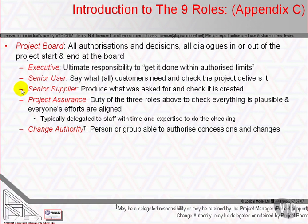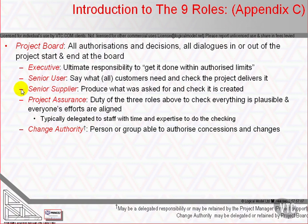The project board members' accountability for specifying and overseeing may be beyond their technical skills or available time. Typically, project board members may delegate some or all of their project assurance tasks to individuals with the required time and skill. The project board may also delegate some or all decisions regarding changes to a change authority, based on the scale, complexity, importance and risk of the project, as well as project board members' expertise and available time. Typically, partial responsibility is delegated to a change board — for example, for changes under some defined cost or time impact — and a change board may comprise project assurance and/or the project manager.